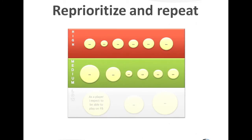We continuously repeat this process. I'm using a simplified three-level prioritization method: you divide and conquer, throw away the end of the backlog, continue upwards, and add more and more details.